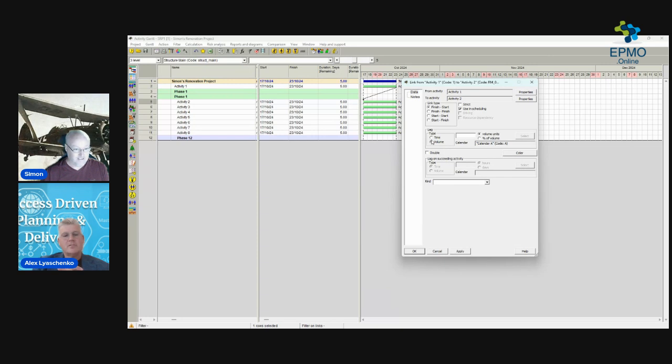When you're creating a schedule, there is an existing technological process. And people cannot tell you in minutes, but they can tell you in volume. I say, from a volume perspective, we can start when this point is achieved. Yeah. But when it's achieved, it depends which type of bulldozer you're going to use. A big bulldozer we can do in 2 hours, a small bulldozer maybe 5 hours. Yeah, I cannot tell you now. I don't know which bulldozer is going to be available at that time. Don't ask me.